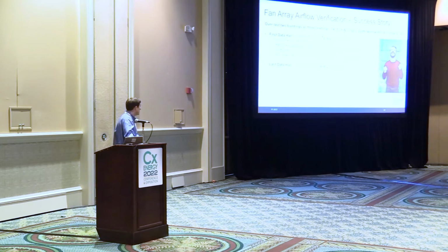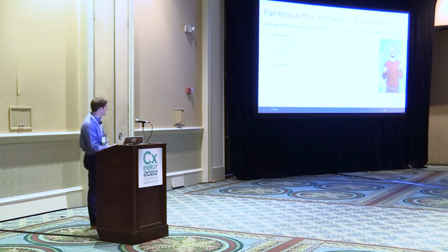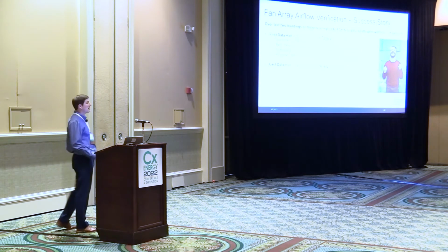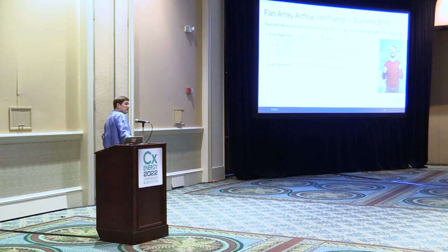Our last data hall there took 6 days to fully test. So when you are an owner, a general contractor, a mechanical contractor, and you're getting repeated success, and we say, hey, we cut it down from 72 to 6 days, everybody's feeling pretty good. And that helps us out as a TAB company, because we're always the ones who get kind of squeezed right there at the end.